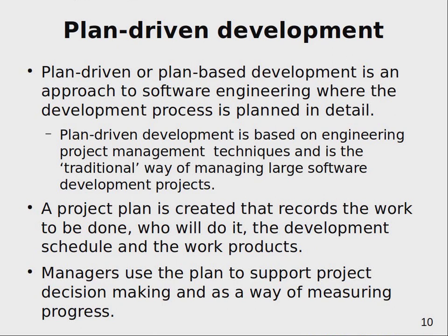My approach when I worked as a freelancer was that I never assumed more than 1/3 of my actual workload to work on any given project. Mostly I worked on one single project at a particular time, but you know that workload does not finish immediately after deadlines, it has some sustained decay, so there were some overlaps.